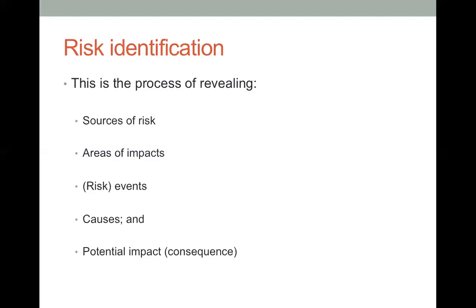If we do not specify the risk events through identifying the possible causes, we are pretty much outlining a generic risk event, and it will be harder for us to solve that. Remember, if we specify our risk events, we are going to have a specific action point, which is fantastic because we can direct our stakeholders in the right directions rather than talking about something in general.